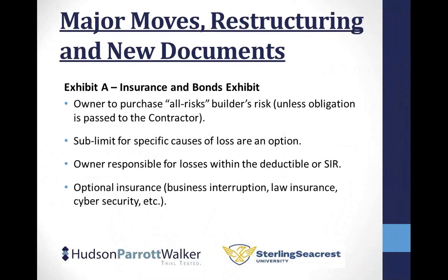And historically in the AIA documents, that's what it contemplated, a property insurance policy. The problem is that a property insurance policy has gaps in it. And the gaps are gaps in coverage. They are things that won't be covered that'll create the subrogation problem that he's talking about. So the solution I was faced with drafting these contracts over the years was we always had to go back to the owner and say, you've got to get a functional equivalent of an all-risk property policy. And this is an example of the AIA appreciating that kind of negotiation over the years and changing that.